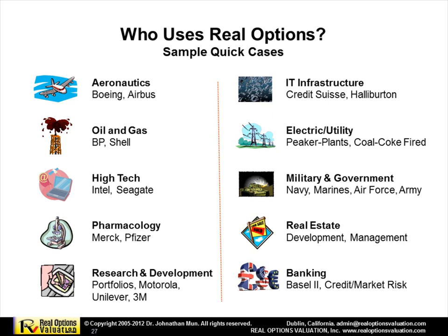So Boeing uses an option to abandon, or abandonment option, and an option to switch, or switching option, to hedge the risk. For example, they perform parallel development on, say, 5 simultaneous prototypes, 5 simultaneous engines, and so forth. As uncertainty and risk become known over time, through actions and events, they can abandon one of the prototypes if the engine doesn't work, if it blows up. You can pull the plug, abandon one prototype, and reallocate the resources to the other 4, 3, 2, eventually 1, thereby mitigating the downside risk. So you have the option to abandon and the option to switch in this case.